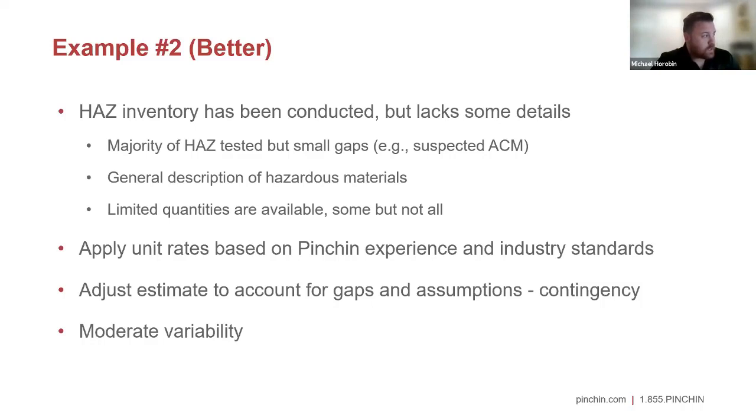We do the same thing. We apply a unit rate based on our experience per material, not just per square foot. We adjust estimates to account for gaps and assumptions with the contingency. This version has a moderate variability, and I'll explain a bit more on the next slide.